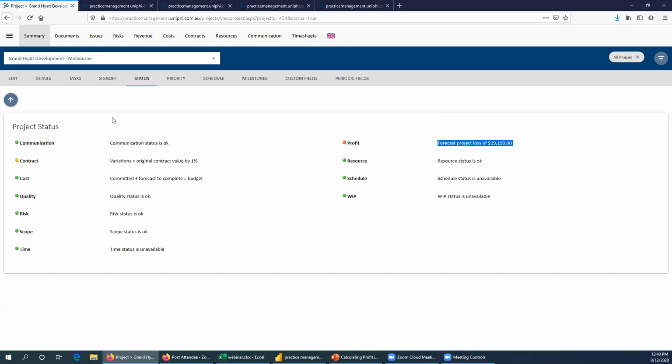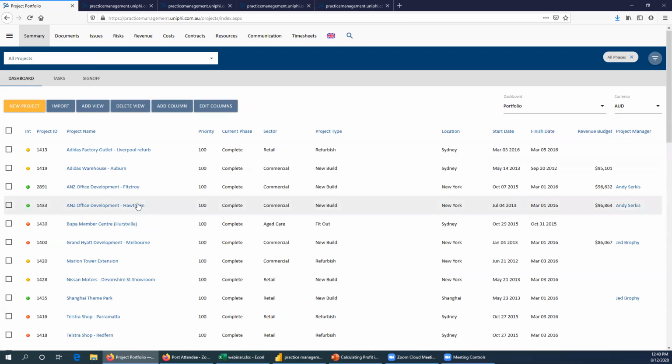That figure should match the at completion forecast for that. There's actually quite a long-winded algorithm determining all the different various profits there could be, like a financial loss in the financial year, a financial loss at completion, an actual loss to date, all those sorts of things. And they're the sorts of things that will then drive that to go red or yellow. It'll go yellow within tolerance of percentage margins. If that's something you can get generated across your business, you can start to use that as a way of quickly seeing which projects are running not too well.